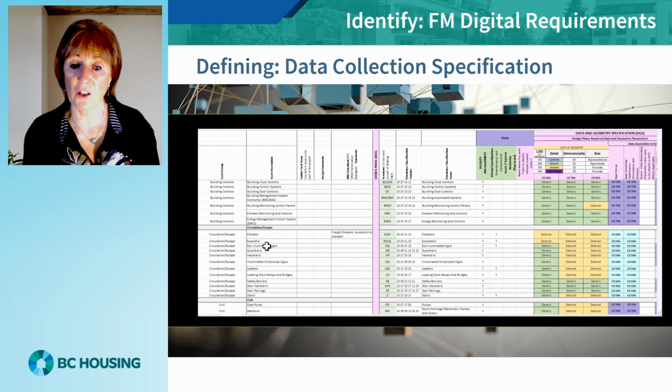The specification links together classification system, name and number with acronym, required data fields in design, required geometric development on the submission timeline, and construction requirements. The organized nature of this specification provides an agreed and defined structure that can easily be audited against the model dataset to ensure that required information has been provided.